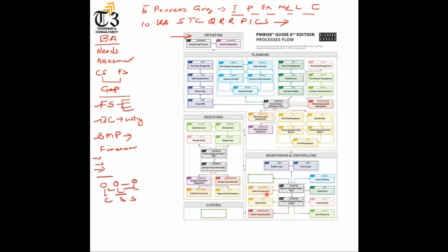You have to collect all the documents, and the process is called administrative closure, where you have to collect all the documents, get the acceptance from the customer, perform supplier evaluation, make the final report of the project also, covering how things worked for the procurement at least, and then submit it to the customers. And if someone comes saying they have claims, you have to review the claims. If you feel they are legitimate claims, you have to close them. If you think they are not legitimate, you will send the supplier to the claims department and you will close the phase of procurement or project.